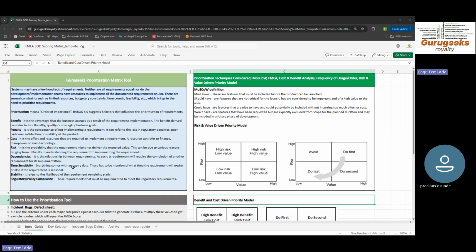So what are the things that you need to do? Let's pick one epic, for instance, engagement. Under the engagement, you need to, of course, agree on your date. So you need to speak to multiple people to agree on dates. Speaking to different people can be your task. Your story can be titled communicating with family members and stuff like that. Then you start to list out the different tasks that you need to do.